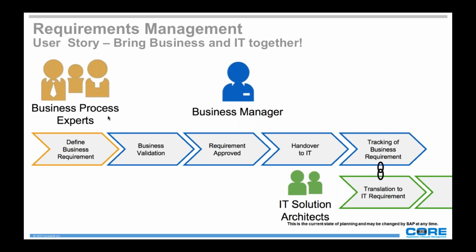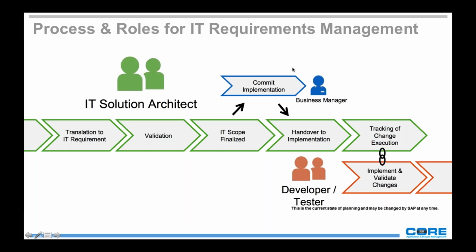The IT department would review that, say, okay, cool, I understand what you wanted, so I think we can commit with this work, right? I think this is going to require a certain amount of development, 1 or 2 developers, 2 weeks of development, and all the different information, but it's keeping track of the same document, right? So once my IT department says, okay, let's commit with this work, it takes 2 weeks, this is the amount of work, this is the design document, this is what we need, we expect this as a result of this requirement. And then what do we do now, right? The document's committed between business and IT, so it's ready to send for our development team.